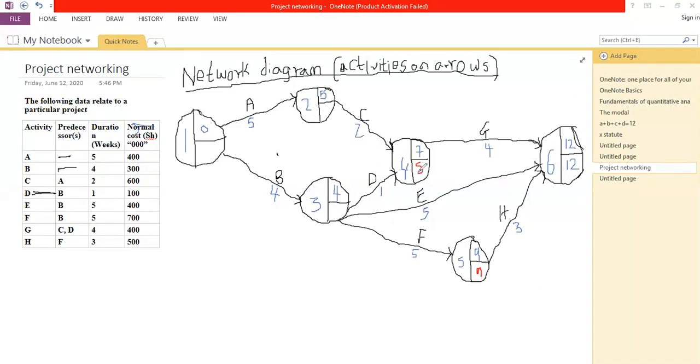Then here, we're required to do a comparison among these three roots coming from this circle. So I'll begin 8 minus 1, that will give us 7. 12 minus 5, that will give us another 7. And 9 here, 9 minus 5, that will give us 4. 4 is the smallest among those three figures, so we pick that particular value.